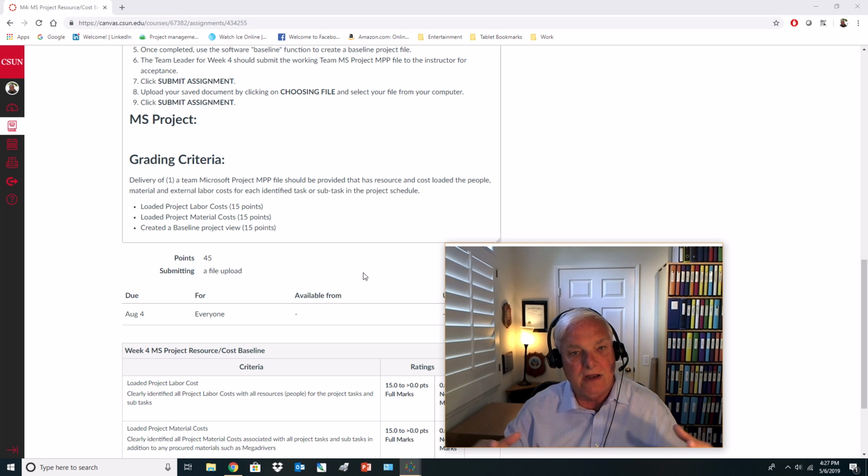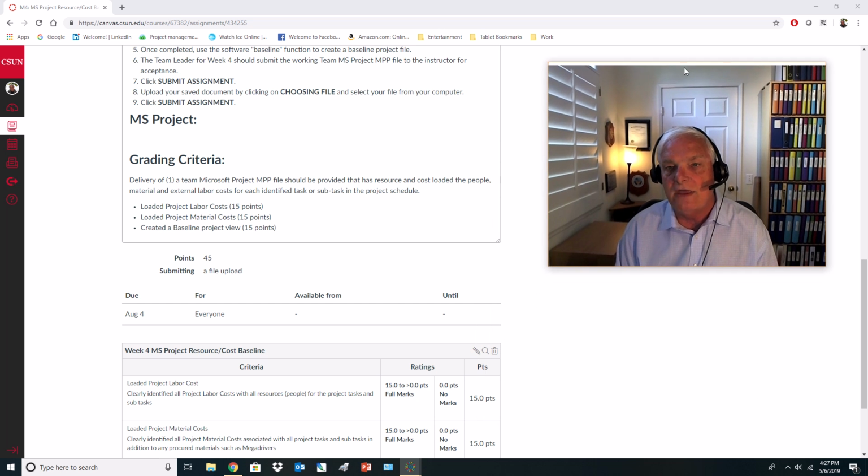and I'm assuming that you're working as a team, so you're going to delegate out to people. Hey, for a plumber, how much should we charge per hour? Hey, to get the testing done, how much should it cost us? For the feasibility study, how would we lay that in? So you're going to have people that you will delegate off to give you information. Rates, how many hours, are there material files? What type of costs do we have? You want to go ahead and lay all that information into the Microsoft project file.